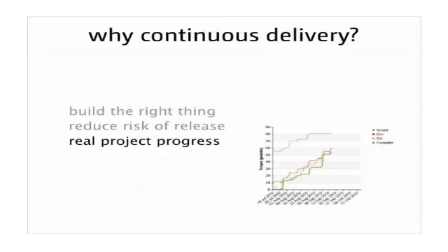You get 80% done with your features, and then you discover the system won't actually scale to the expected load, or when we test for security, there are some security problems. The architecture we put in place doesn't fundamentally support the performance characteristics we're expecting. These kinds of problems are very, very common, and most of the risk in delivering software occurs after they're complete and before go live, or during go live if you're really unlucky.